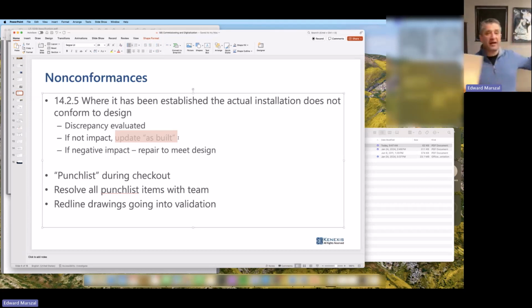I've got my starting point. I haven't done these yet. I have my green pile, which means I checked them out and they're good. And I have my red sticker pile, which says I need to do something. And basically the project isn't done until all of the folders are in the green pile. So the starting point is empty and all the red stickers have been repaired.